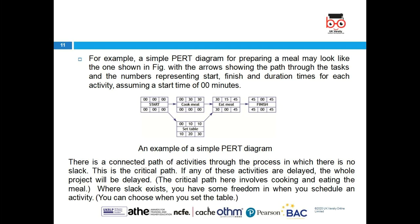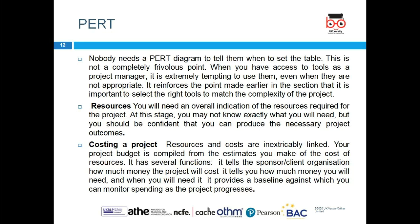A practical example: if you want to plan and cook a meal and finish in 45 minutes, you need to look at the start time, cooking time on the fire, and then you can set the table in parallel. Then you eat the meal in 15 minutes, finishing in 45 minutes total. Each activity has a sequence, time, and duration, and you evaluate whether you've finished within time. It is important to select the right tool to match the complexity of the project.